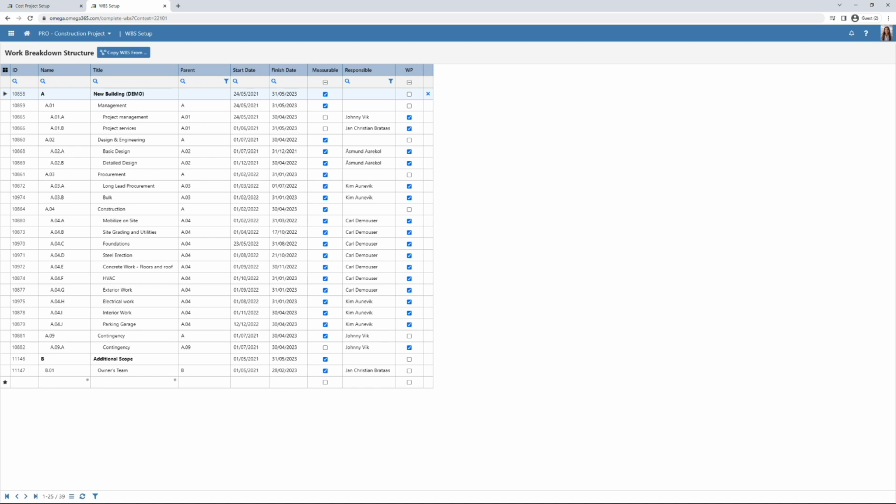At the work package level is where cost and plan is integrated, which enables more advanced cost management features, such as earned value management. Each work package can include activities to be completed and a set of cost estimates. It is therefore very important to have a defined and well-established WBS structure to get a good overview and control of the costs related to a project.